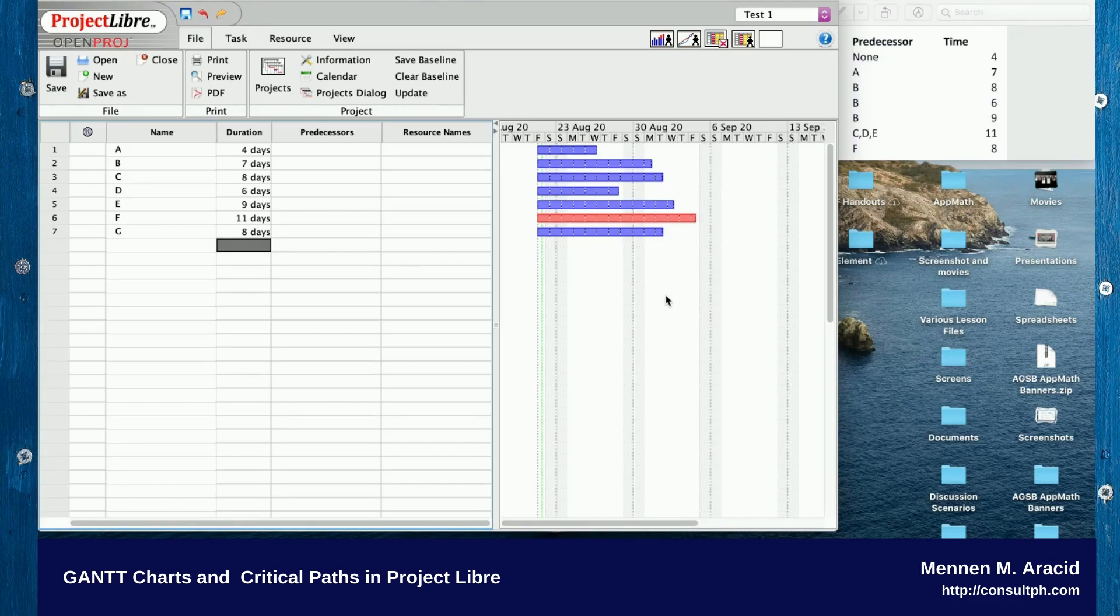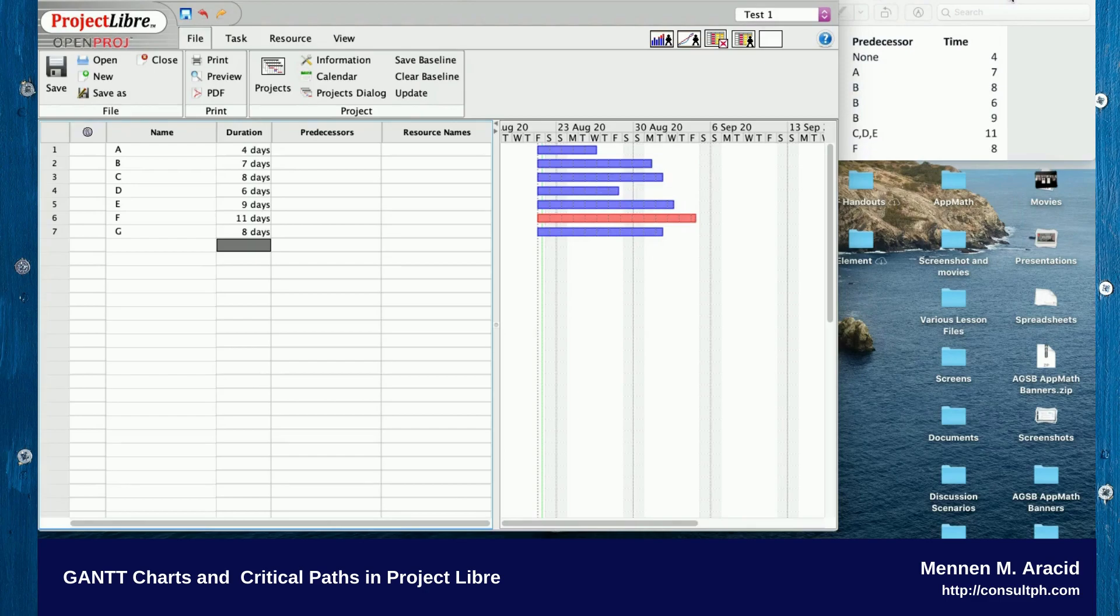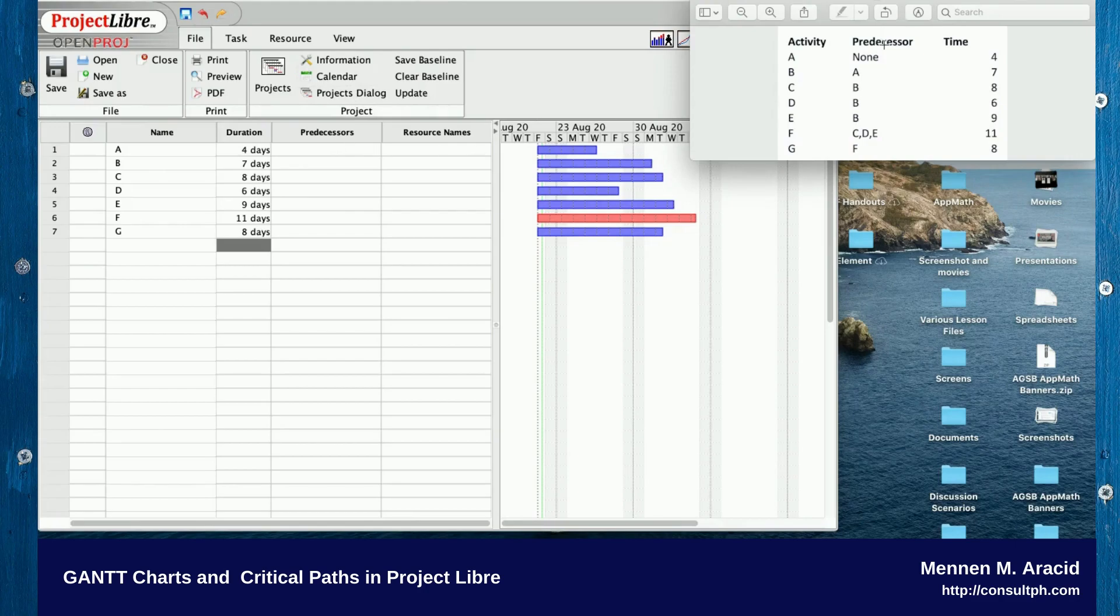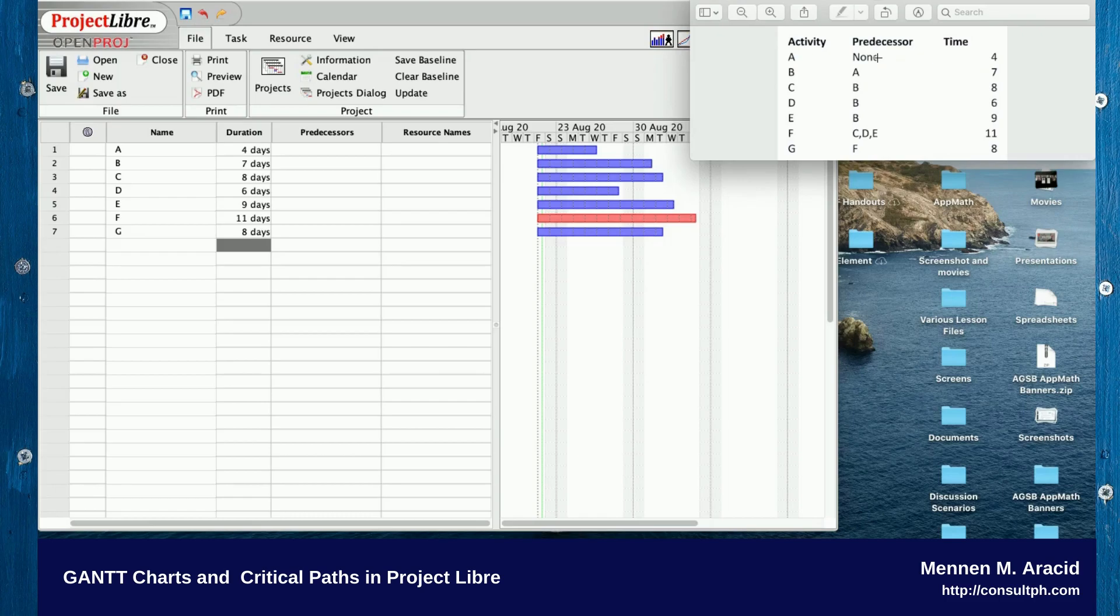The rest of the activities still have what you call allowances. In project management they call that slack. Now we encode the predecessors. Predecessors are activities that need to finish before the next activity can begin. The predecessors for the activities are on the right side. Activity A has no predecessor, so you can leave that blank.